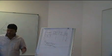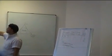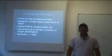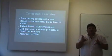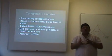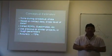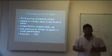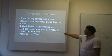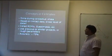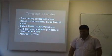So there is limited data, but there is a broad level of data. The conceptual estimate is also called a ROM, which is a rough order of magnitude. Because at this point in time, you don't know. You are basing your costing on historical data or other completed projects that are similar in nature to the one that you currently have. So this is called a rough order of magnitude estimate, a guesstimate.